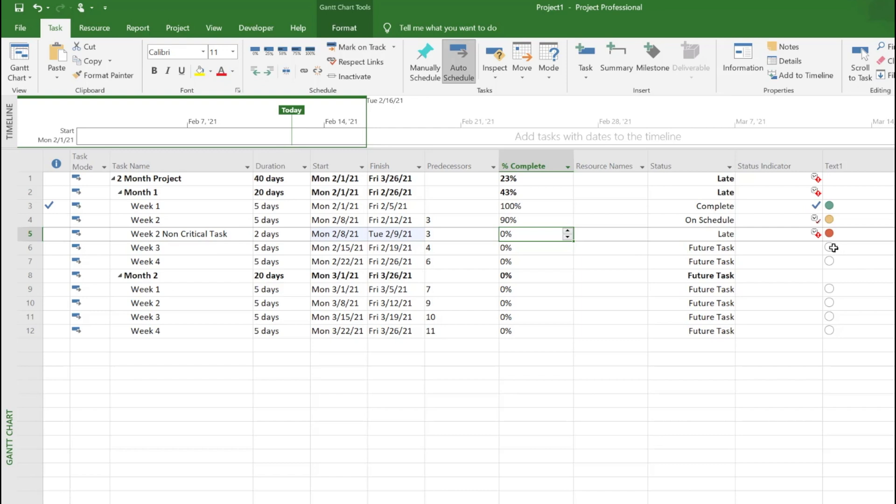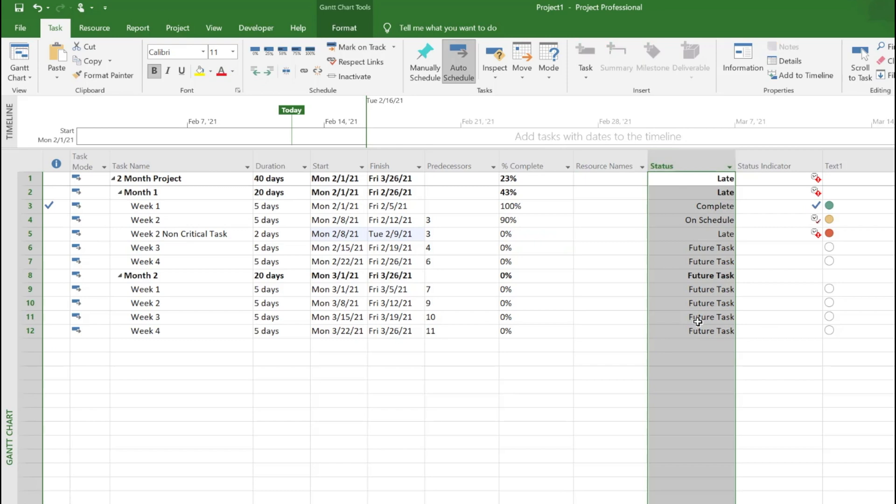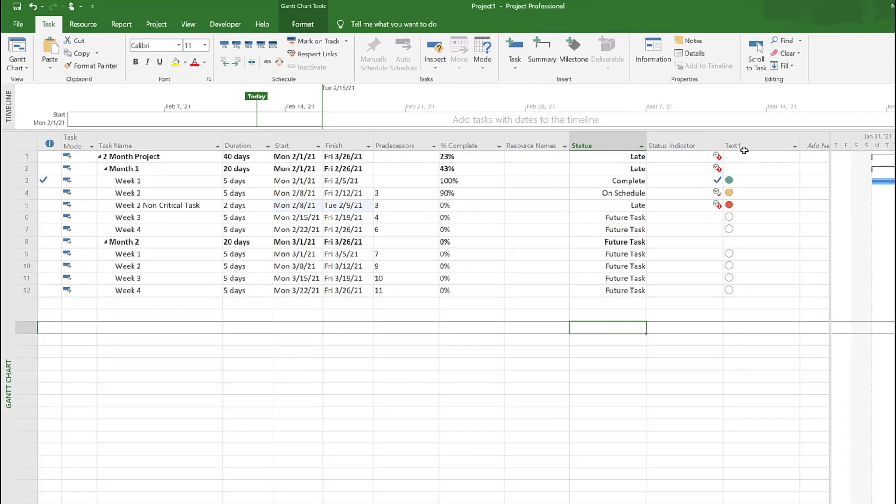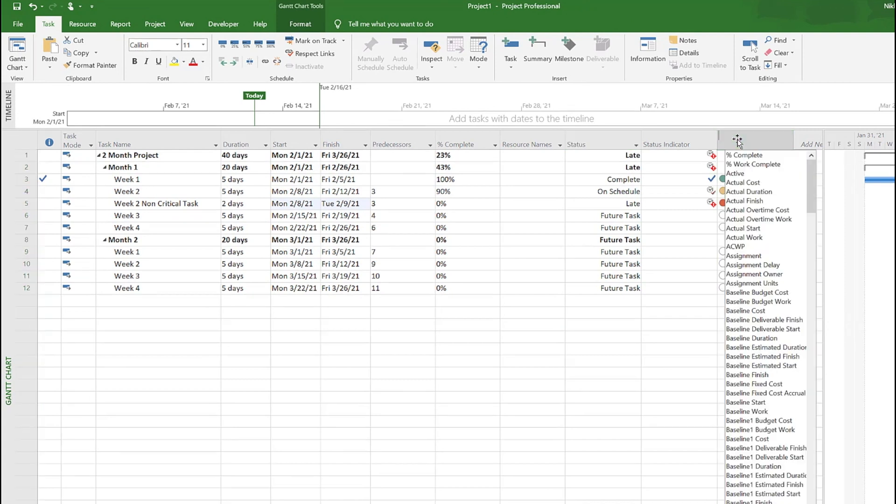White, which is future task, is three. The status internally in Microsoft is stored as zero, one, two, and three. You just assign the graphical indicators to those numbers. That's what I did here.